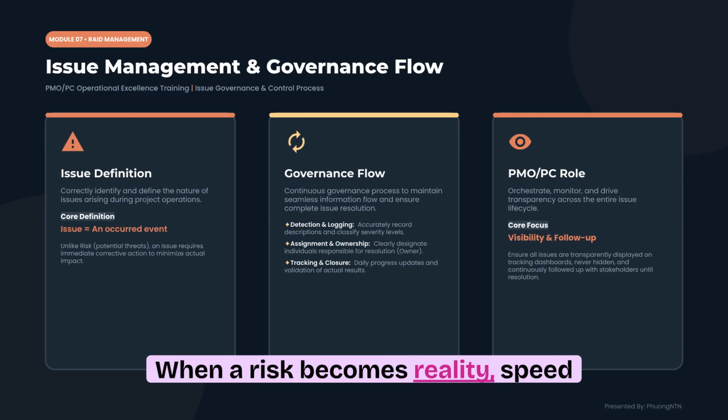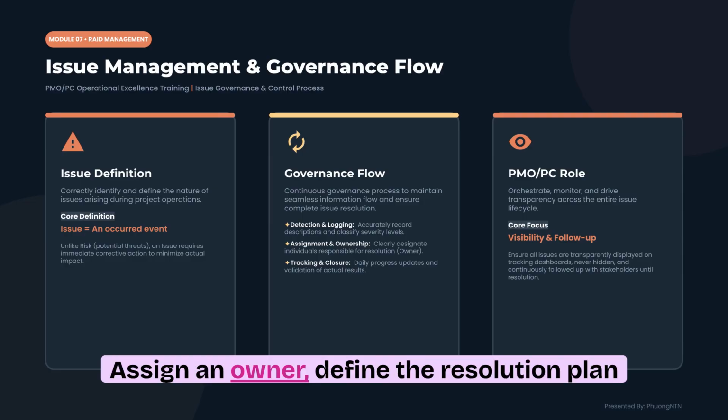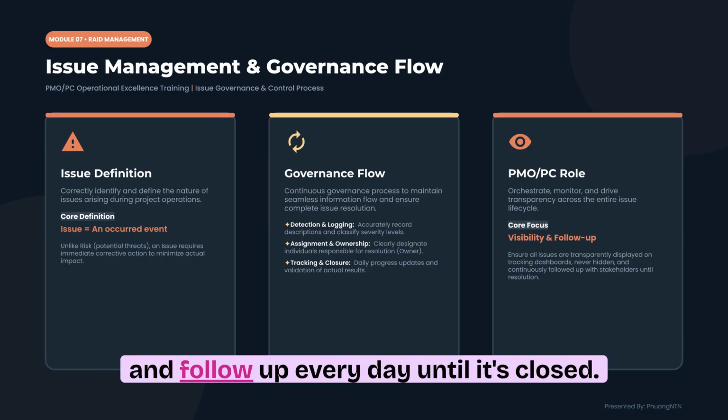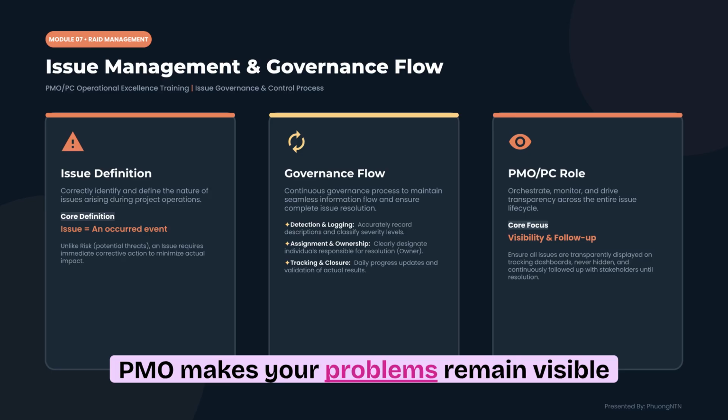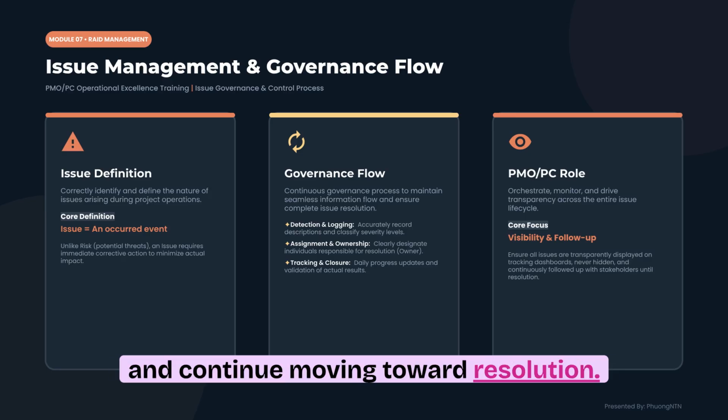When a risk becomes reality, speed matters. Log the issue immediately, assign an owner, define the resolution plan, and follow up every day until it's closed. Remember, PMO doesn't solve technical problems. PMO makes sure problems remain visible and continue moving toward resolution.